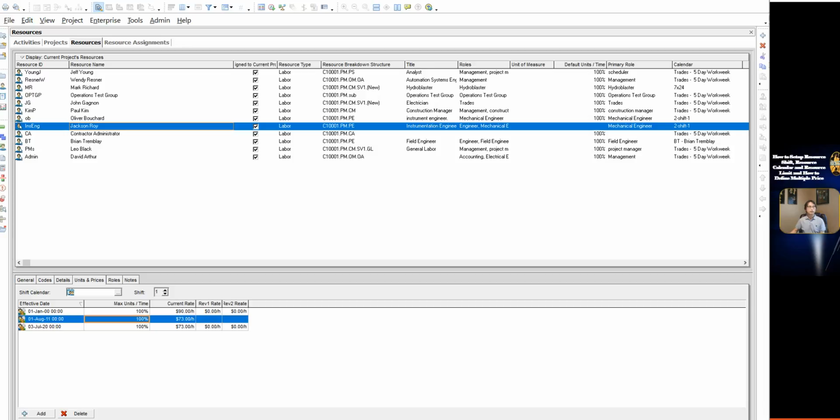First, how to create the resource shift. You can globally define the shift that spans specific work hours over a certain period of time and apply it directly to the resource. The resource calendar is used to determine when the resource can work and determine the limit for that period of the resource.